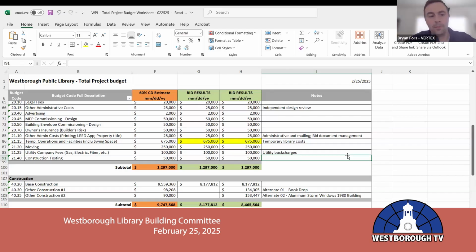Okay, so ultimately, what we need to account for temporary operations is going to be the consultant work and LPA work that's happening right now in identifying what it's going to take in order to gain occupancy into this building. We had a pretty strict list of documents and assessments that are needed from the building and fire departments of the town. And LPA has engaged with a consultant, and we will present that proposal to the committee today.